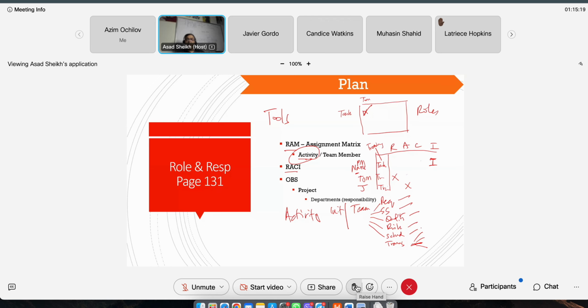Well, schedule planning, the PM can become responsible, could be an R here, the PM. Because schedule, really the PM is the one who takes on that task, gets the information from everybody and puts it in there. So the PM could be that one. So then let's say we're talking about, who's going to take care of the IT stuff? Who's going to be taking care of the network stuff? Who's going to take care of the database? So as you're going through different tasks, different types of work, in your RACI matrix, you are allocating who's going to do it and what role they will be playing.